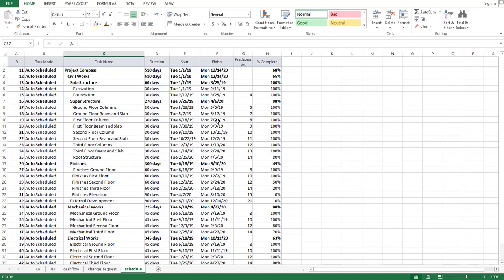Another thing you have to notice is that I started my task ID with 11 instead of 0 or 01. This is another issue with Power BI. When you go to filter out or sort out this activity, the 1 is considered first, then 2, then 3, then 4. So if we go with 01, that will be considered in Power BI as 1. It will neglect 0. So you need to start with 11 in this case.